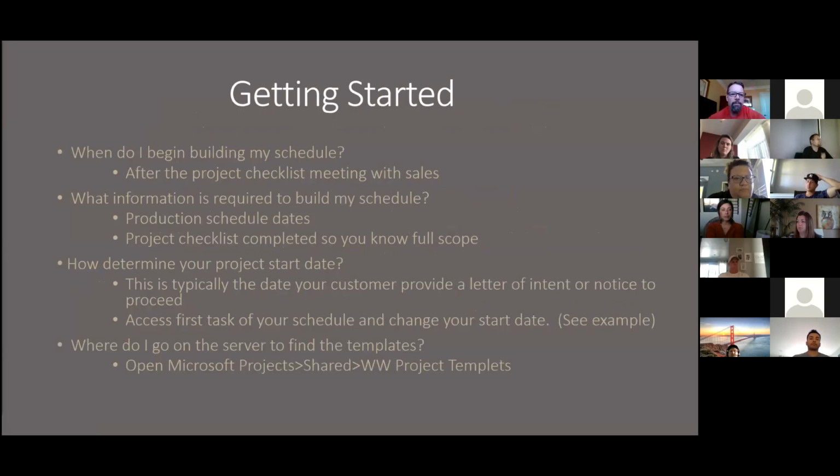Okay, getting started. What do I need to build a schedule? The first thing you need to do is have a kickoff meeting with the sales team, and in there you will be walking through the checklist that I showed you earlier, going through all of those items, and trying to get every answer that you can for every item that's going to be on that checklist.